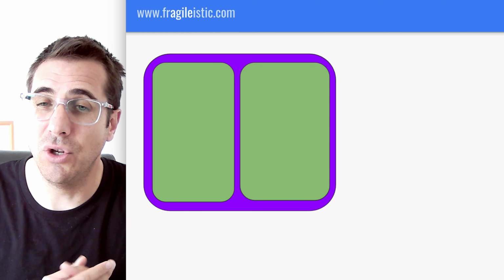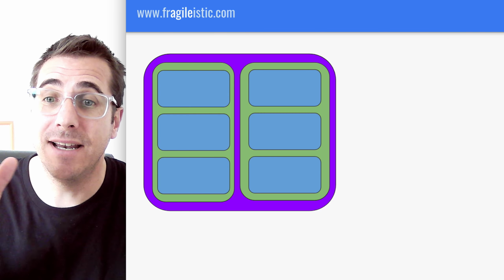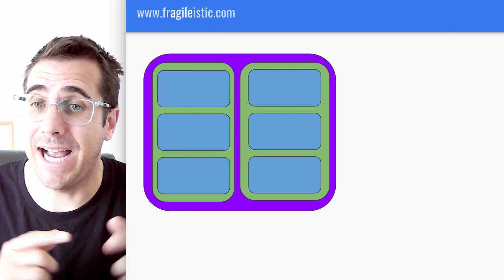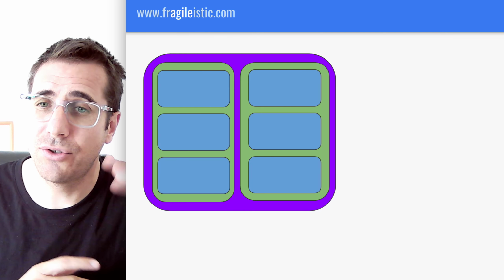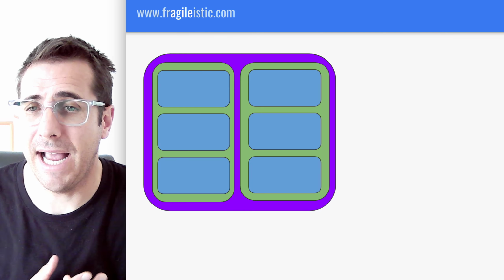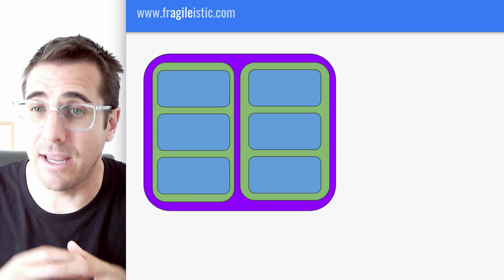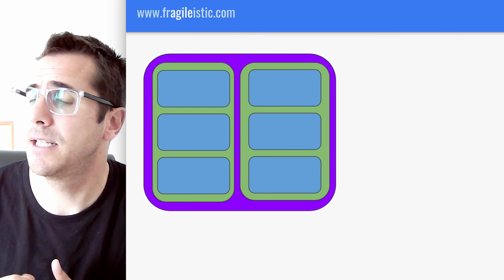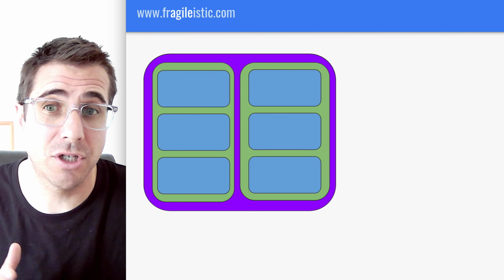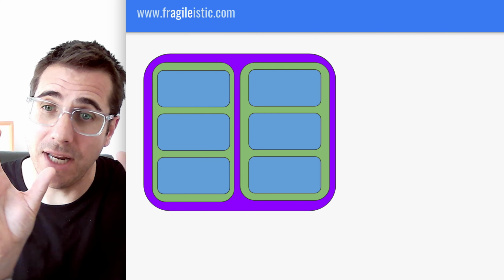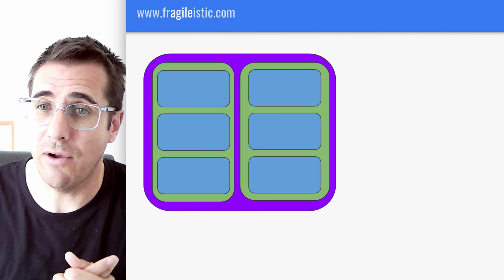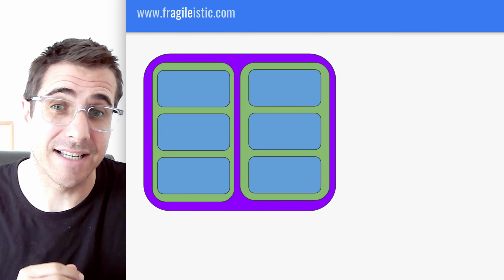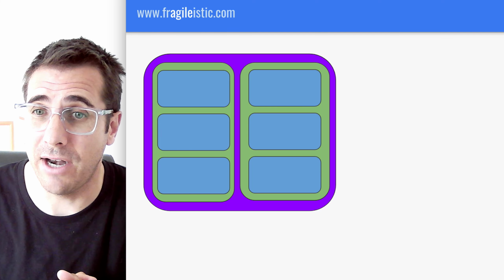That might be the user stories. But they're work that can be done in a time-boxed amount of time. And then into there, we'd have tasks. So there are 3 tiers there. We've got the big thing, the big outcome that we're trying to achieve that can't be done in a day, which is a time box if you're working landscaping, or can't be done in a week, or can't be done in a sprint, but it's the big outcome. And then underneath that, stories, a customer outcome that can be delivered within a time box, and underneath that's the activity, the tasks. And the colors there are what you've got in Jira.